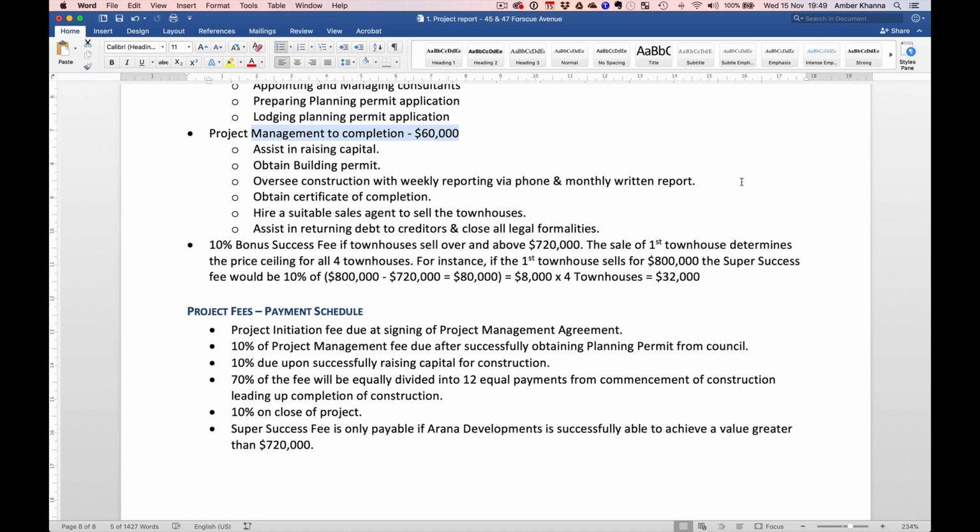This report that you are presenting to them will eventually convert into a unit holders agreement, or become an annexure to it. In the unit holders agreement you will say that Will is the development manager for this development, and that's the fee the unit holders have agreed to pay him. This is the scope of his work, everything you have mentioned in here. But in case he doesn't deliver on what he's saying, he won't charge the development management fee, or the fee will go down in proportion, so that there is a minimum something there.